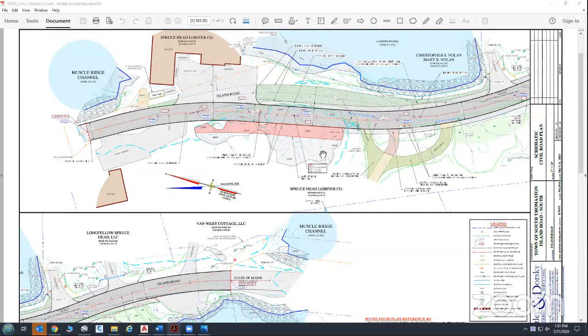I think originally when the asphalt prices dropped down to historic lows or recent historic lows, it helped with the asphalt pricing. But now that we got down to the bottom, we've been on a steep incline for asphalt pricing. You can still receive some really competitive asphalt prices. When you get into asphalt, I look at it as a price per ton. When I do estimating, I look at somewhere in the $100 to $125 per ton for pricing. So that's based on small projects, and that number fluctuates. When you're doing a bulk project, you can get prices somewhere in the $80 to $85 a ton.